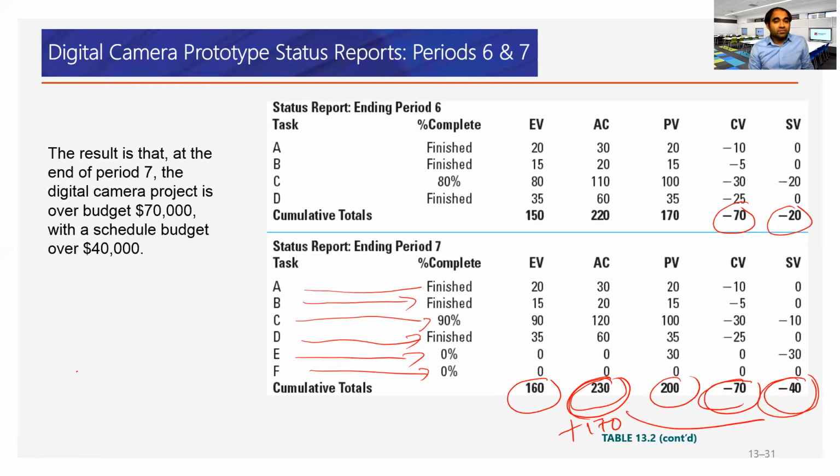Initial budget was 320, right? So it looks like it will be hitting close to 400 for period 8, 9, and 10. If we allocate 10K, it will be 160. All right. So that's how we calculate EAC for the remaining period of time.